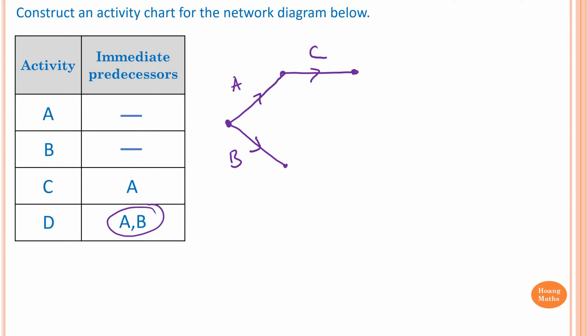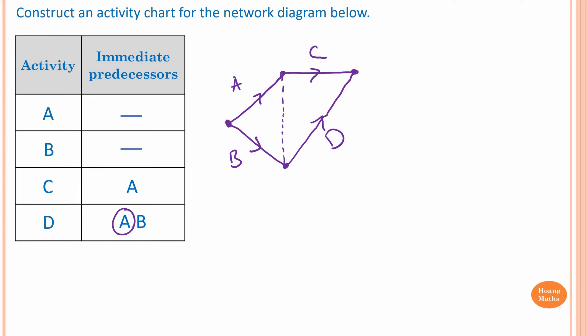For Activity D, A and B are immediate predecessors. So we start from B and draw the network together — this is Activity D. Activity A is also an immediate predecessor of D, but you cannot draw a solid line directly, because there is no activity between A and D. So in order to connect these two, we need to draw a dotted line showing direction — this is called a Dummy Activity.